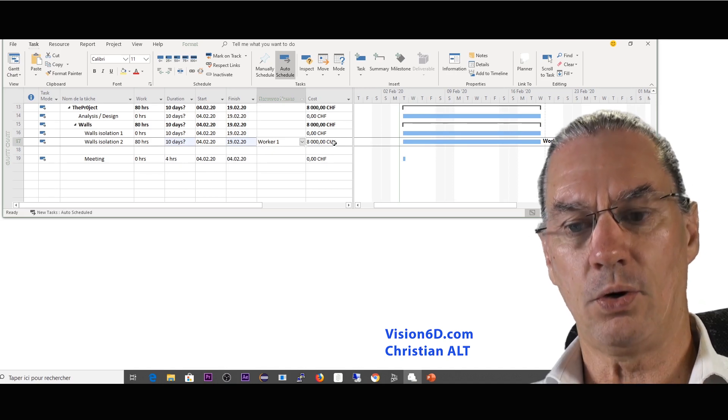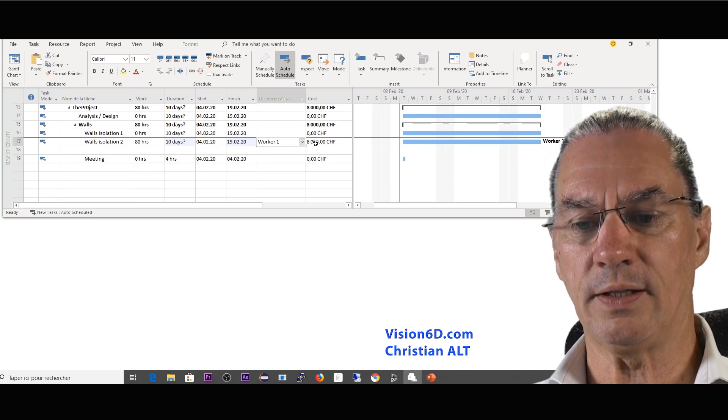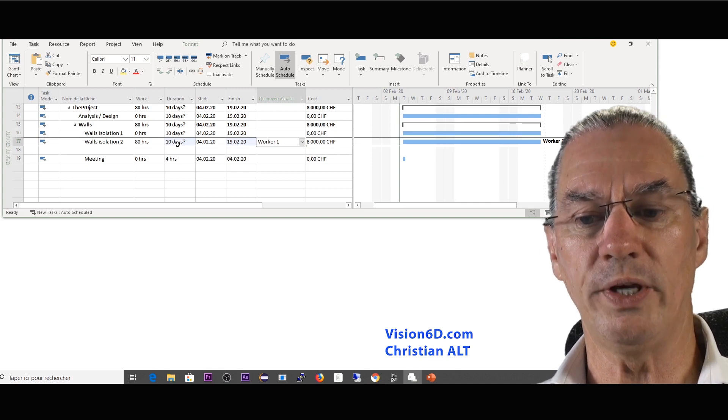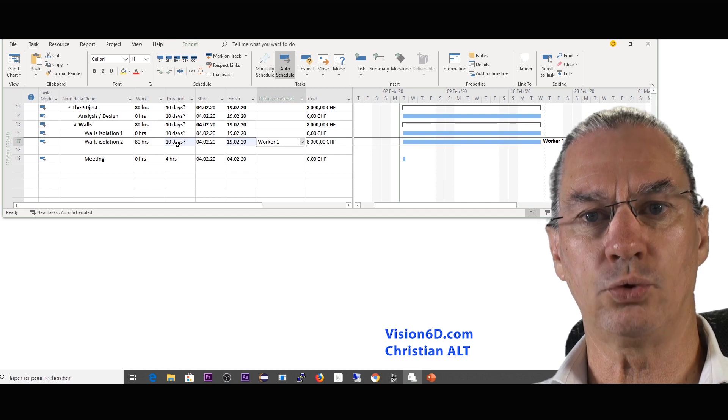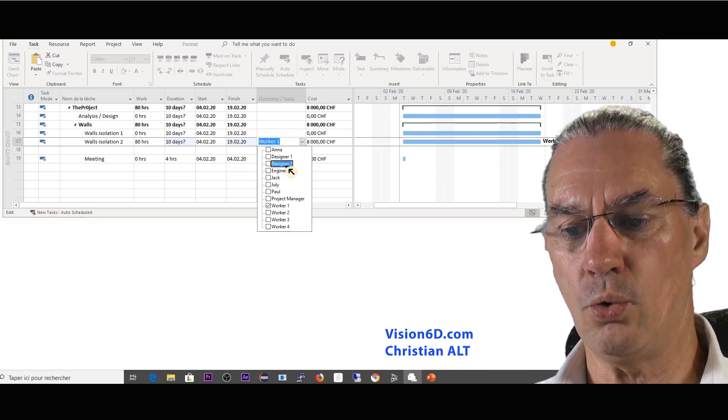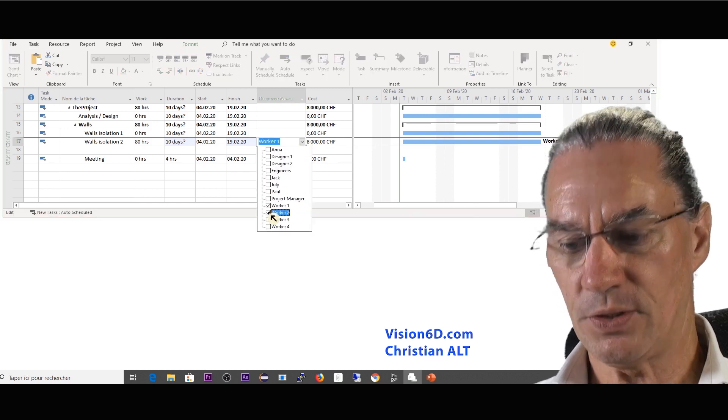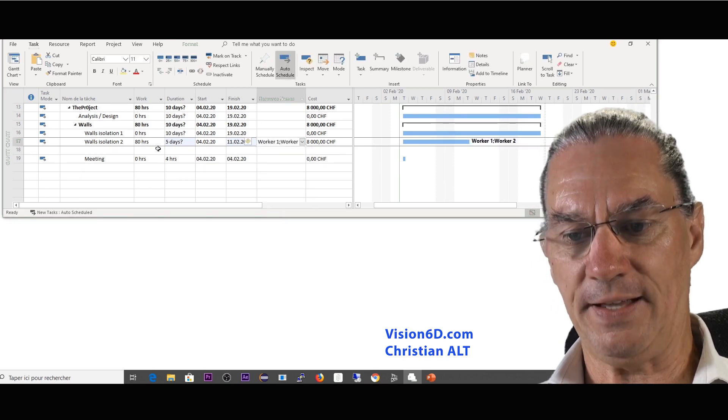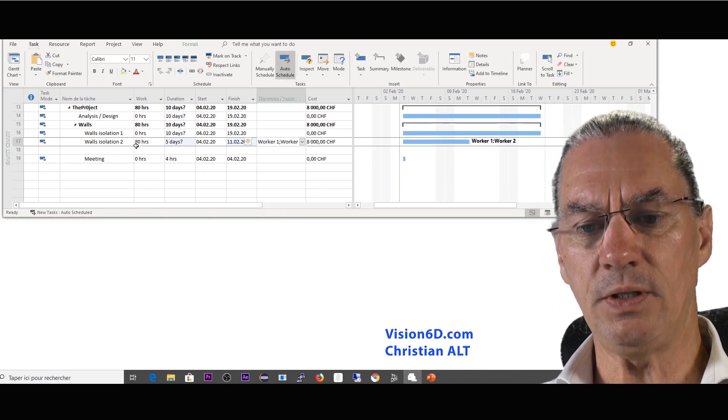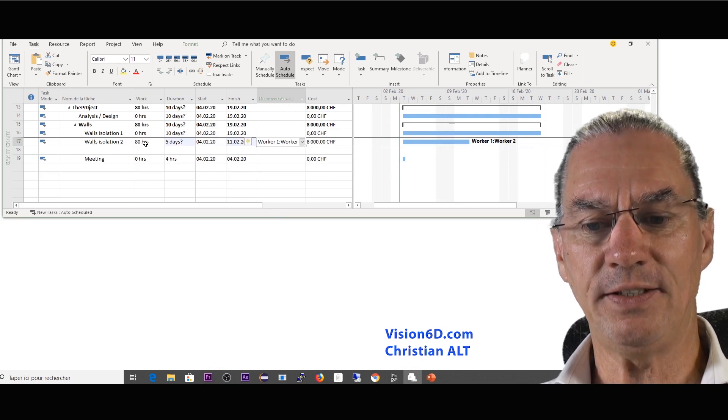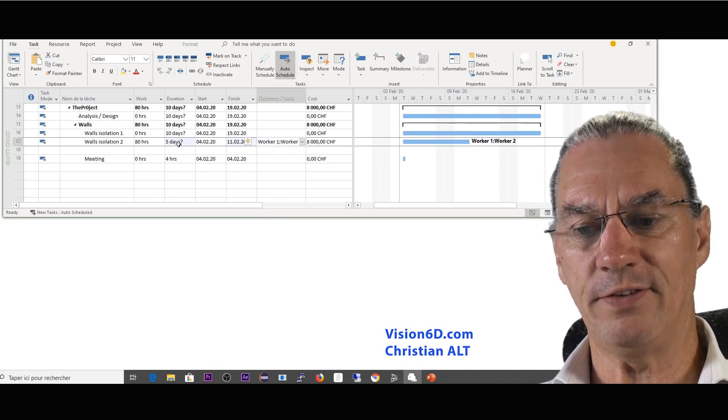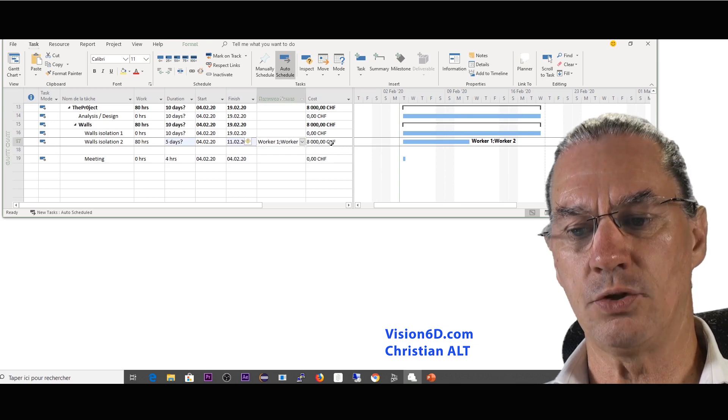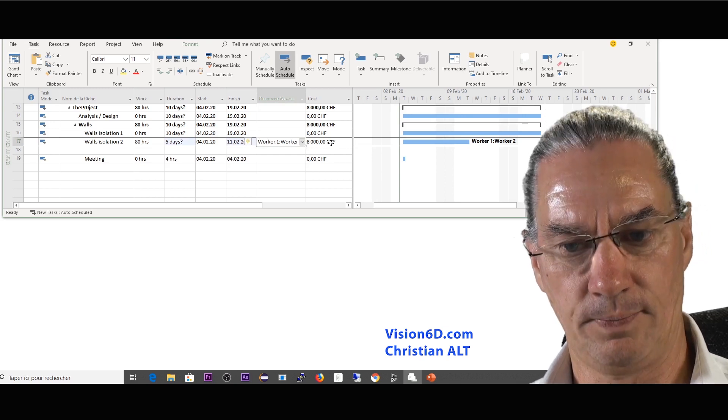So if you remember we said that this is going to last during two weeks and I wanted to shorten this down to one week so I added here another worker. So I have worker two which is added here and you see that the total work is still 80 hours. During five days I have two workers and the cost didn't change, it's 8,000.